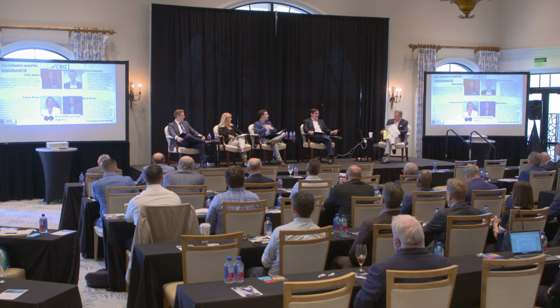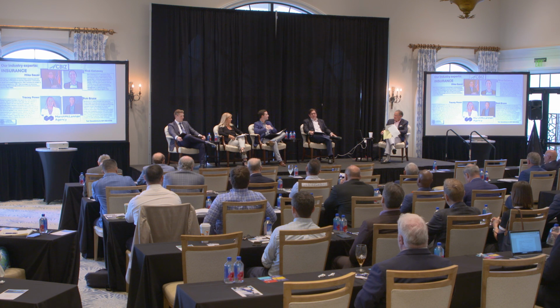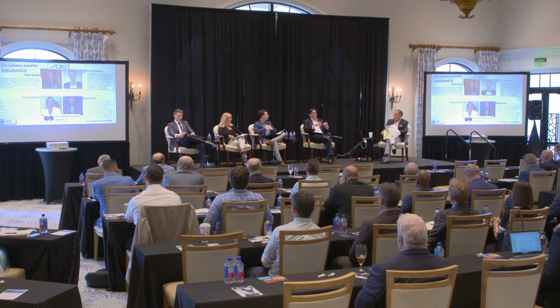Could I add something real quick on that? The other thing we always talk about is what's the cost of the project? What's the premium cost? But the other question is, what is it going to cost after the project's complete? So what Nick was getting at with the spa: you're putting in a brand new spa, you're going to be hiring X amount of professionals to do massages. What is the professional liability cost after the fact?